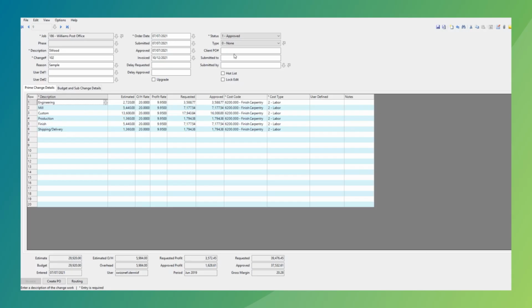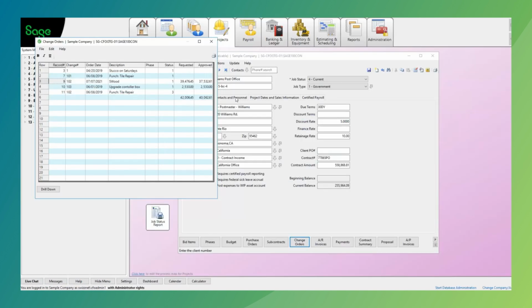And what that means is it allows it to either be appended as a new line item, so if you've got an owner that wants to see change orders separately, or you can append them to the cost code that is actually affected. So when I do my G702, 703, I can do 6200, and it will actually take the change order and update 6200. Okay. Or I can just append it as its own line, and therefore the owner can see separate change orders.